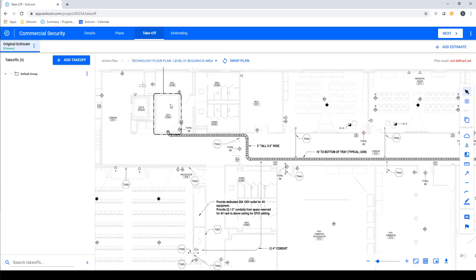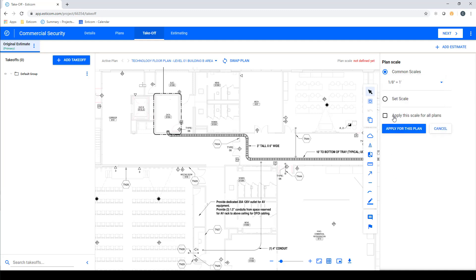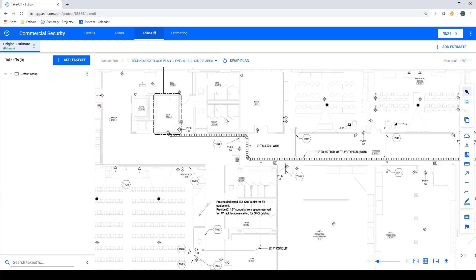Before we begin our takeoff, we'll want to set a plan scale using one of our common architectural or civil scales or by manually setting the scale using a known distance such as a three-foot doorway. In our example today, we'll use the common one-eighth inch equals a foot scale that is depicted on the drawing.